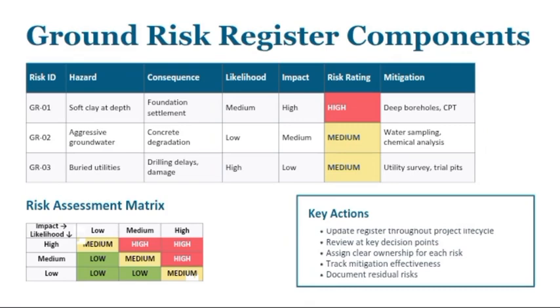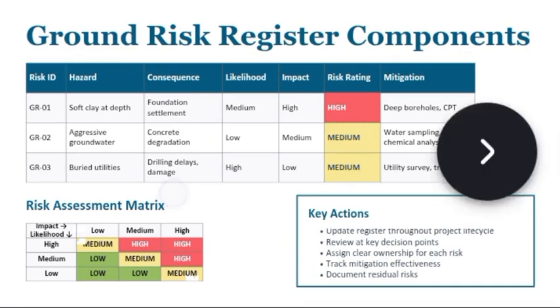Now, the risk register is not a static register. It is continuously updated as new investigation data become available, as construction progresses, and also as site conditions change. So the dynamic nature of the ground risk register makes it a very powerful management tool. You can understand what is going on per time. I hope you get that point. I hope you were able to understand this ground risk register, and understand the essence of it.